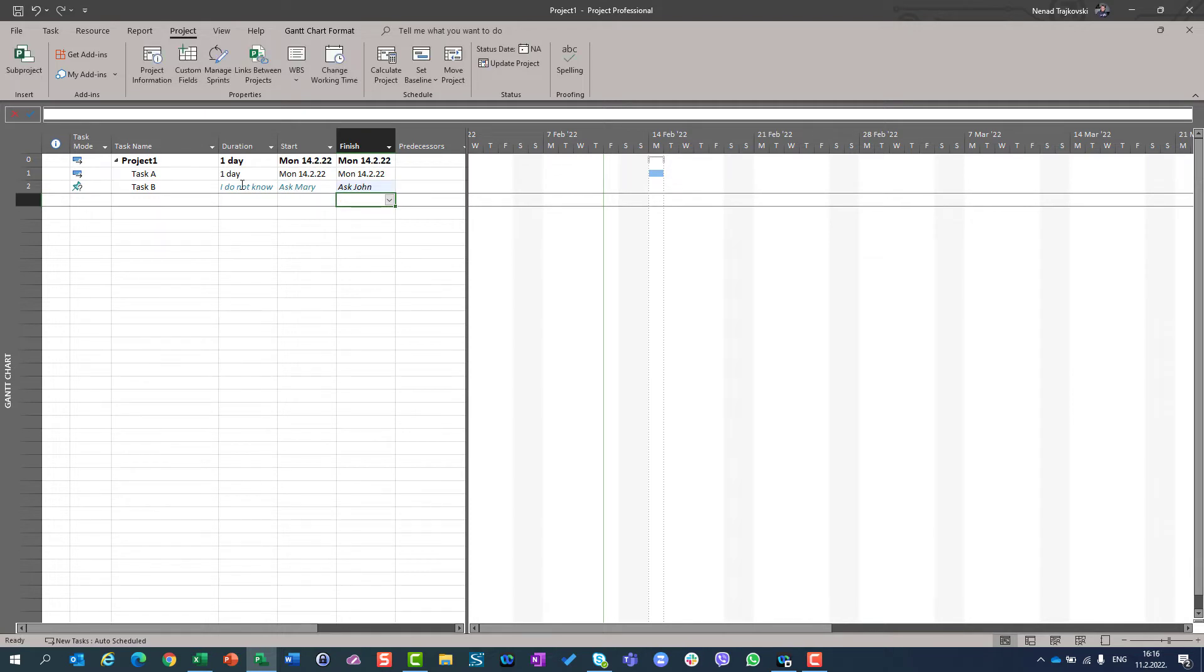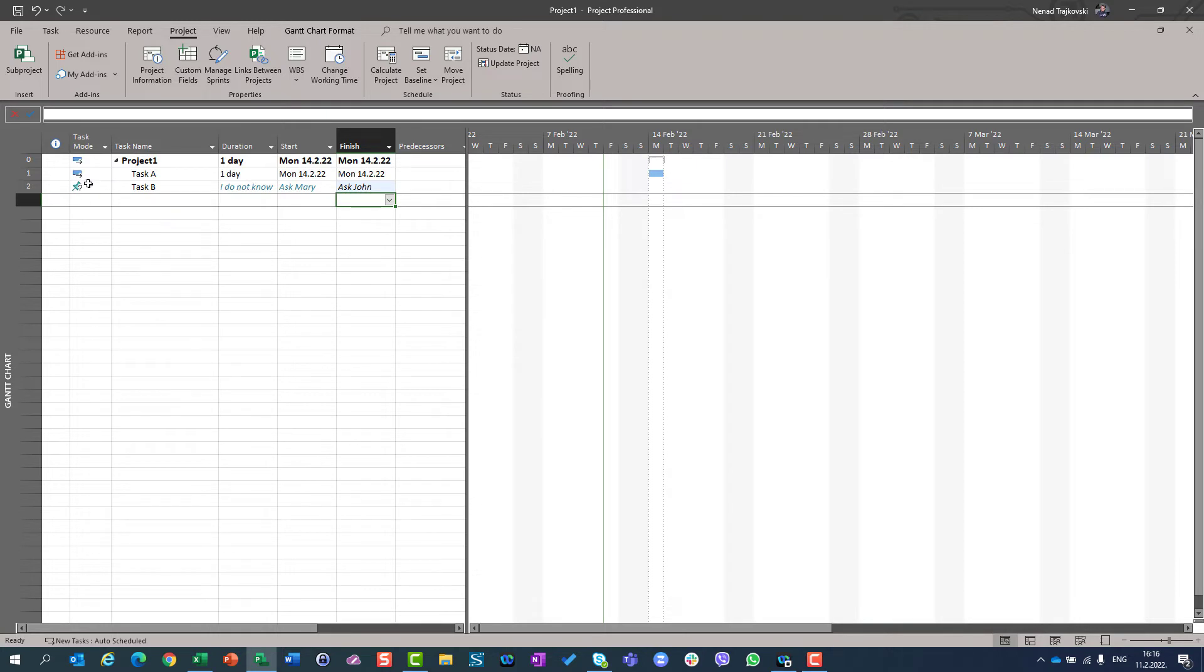Be aware that this is not a great advantage at the end of the story. You can, when you don't have information, it is an advantage. But after all, at the end of the story, at the end of your planning, you will have to know exact duration or start to finish date. So you should, at the end of the planning, you should convert that task to an auto-schedule mode.